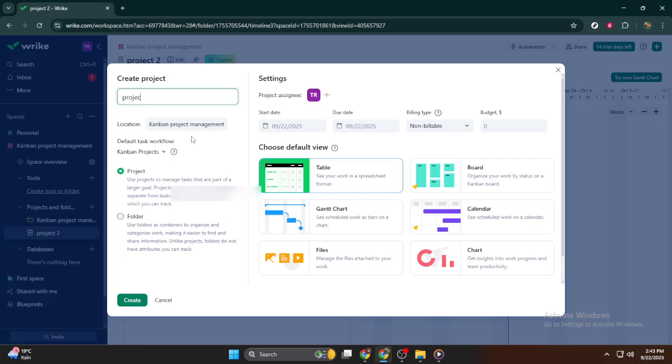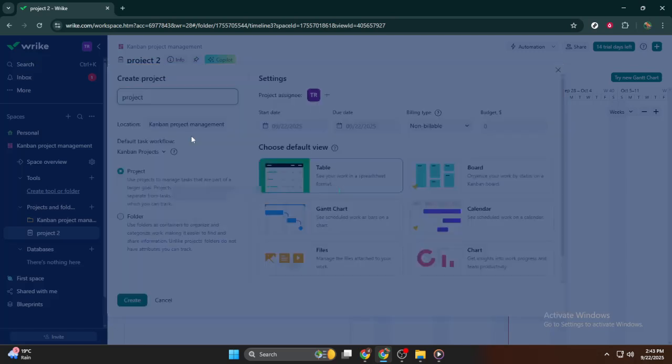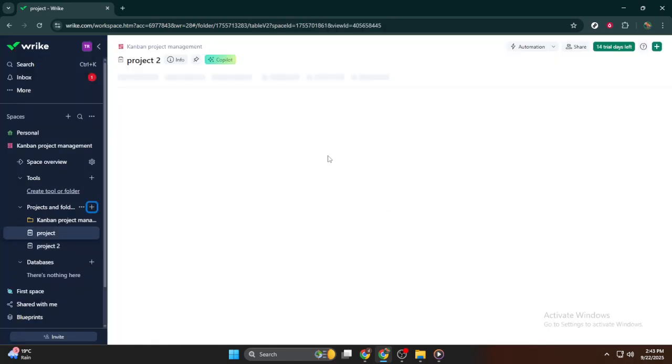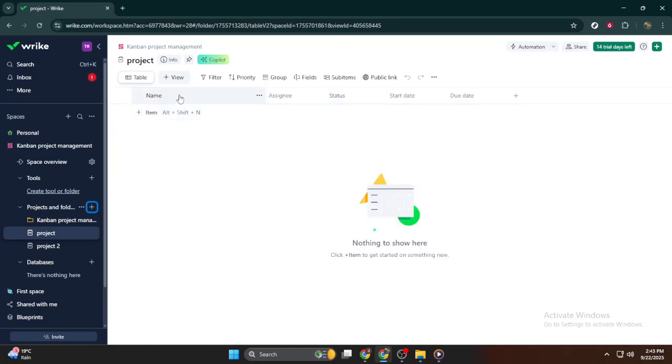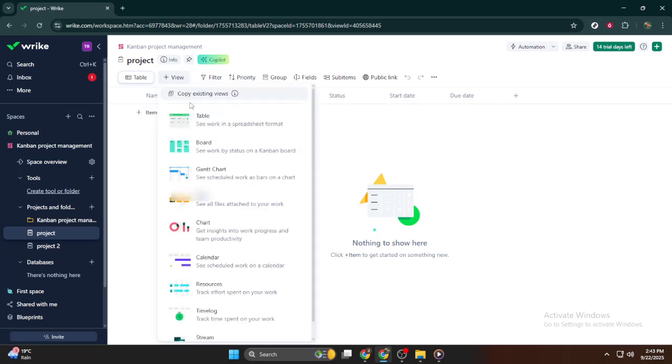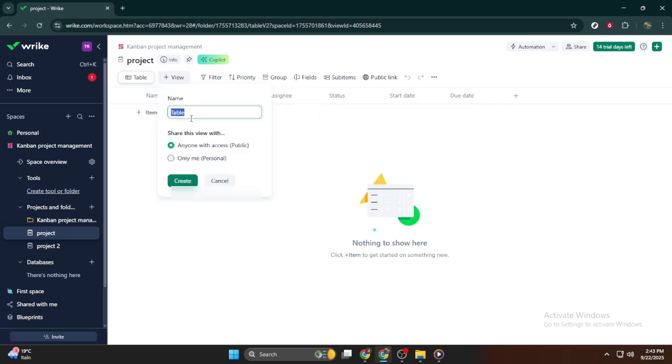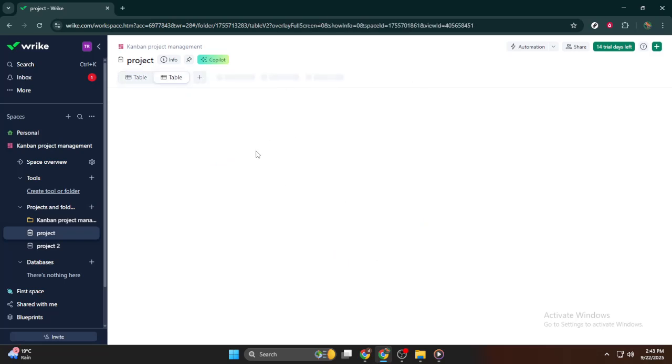Once your goals are set, make use of Wrike's folder and task structure. Wrike employs a folder system to organize all aspects of your project, from the high-level project overview to individual tasks and subtasks. Create folders for large projects and break them down into subfolders for smaller, more manageable sections. Assign specific tasks to team members, ensuring everyone knows their responsibilities and can easily locate the information they need.